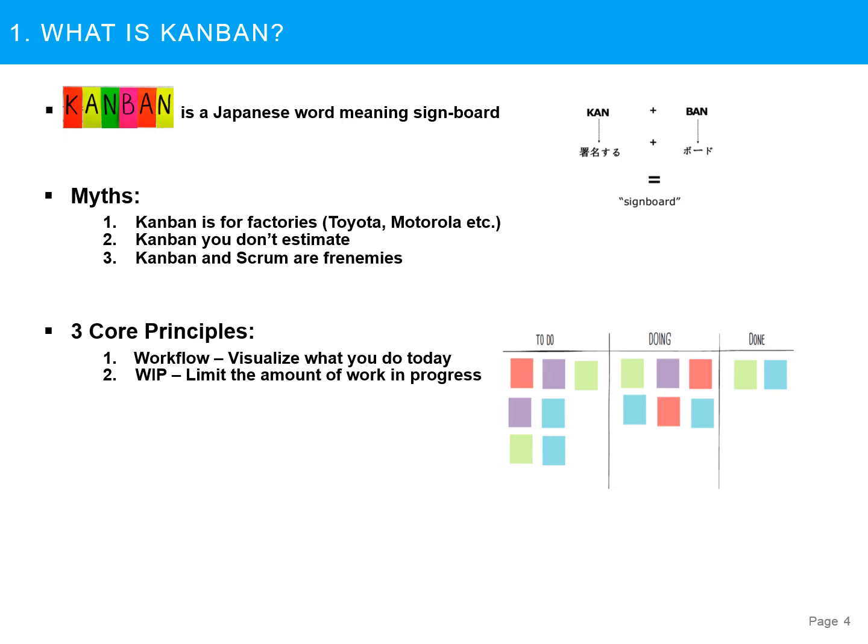The second principle is WIP, or work in progress limit. It actually means limiting the amount of work in progress. So what it does, it helps balance the flow-based approach. So teams do not start and commit too much work at once. So what we are saying basically is we do not want to build a feature that nobody needs right now, or we do not want to write more specs than we can code, or we do not want to write more code than we can test right now. And finally, we do not want to test more code than we can deploy. So that's how you define a WIP limit.